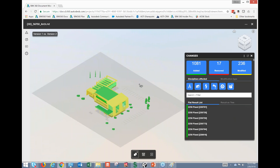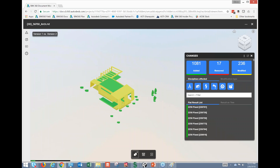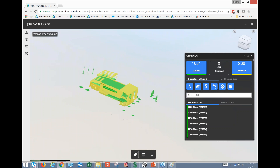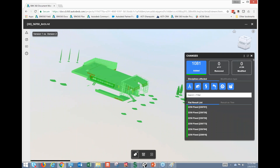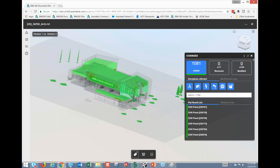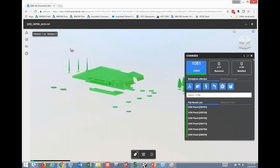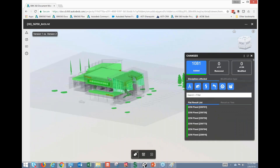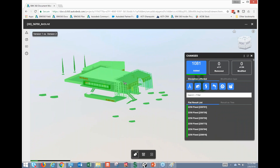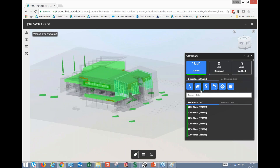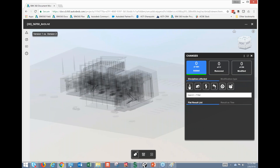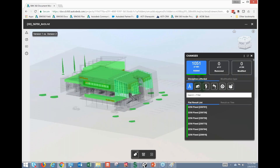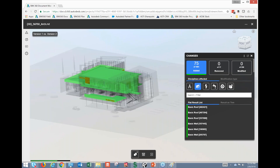Let's take the Removed and Modified out of the picture and just look at Added. It looks like everything on the second floor has been added in this second version — potentially additional scope, but very easy to see. We can go through each discipline and filter — for example, turn everything off and turn Architectural back on to see what's there, or turn on Structural.